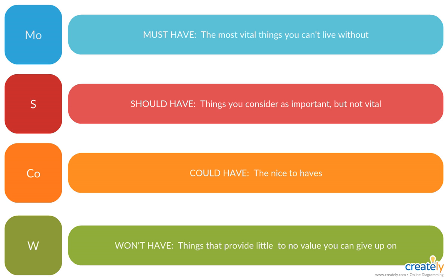And is this where you start talking about story points, where you say you may be able to exchange one that's of similar story points to another? Exactly. Yeah. I think it's interesting that on the second step of this, it sounds like you're looking at both business and technical constraints. Some of the technical, you would look at the story points. What's the estimate on this? Sometimes when you're filling up that shopping basket, you might not reach for something that is really expensive when you could get two of something else. So you are really factoring in both business and technical constraints to what's the order of what I'm doing.